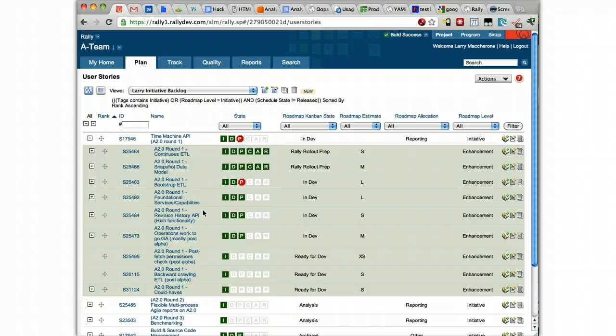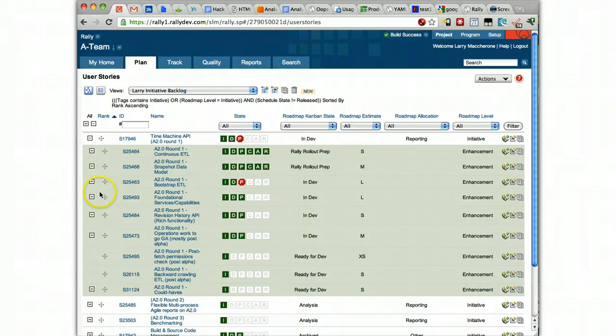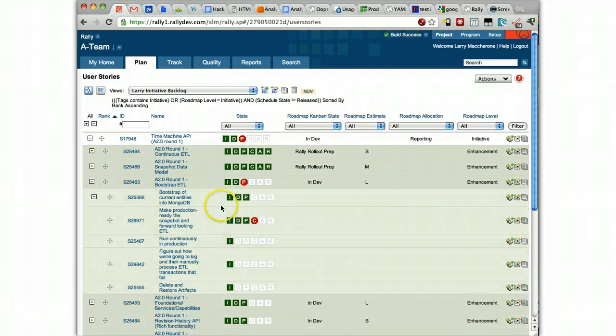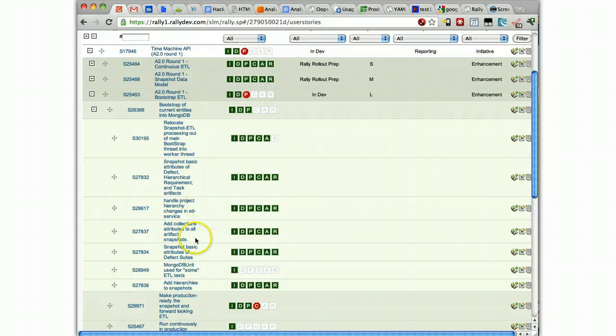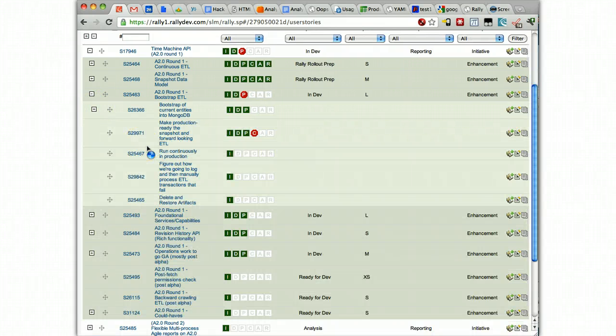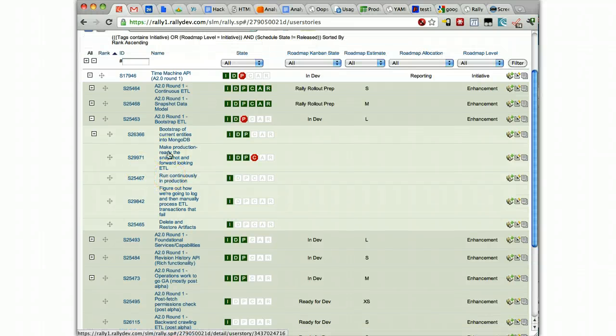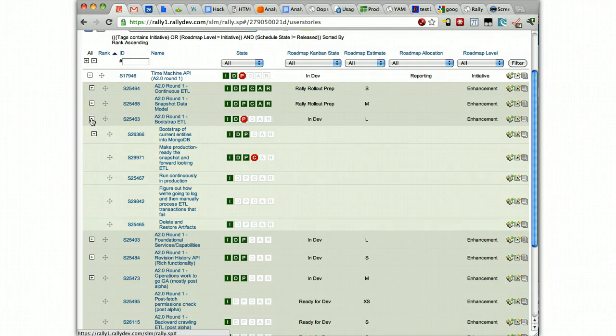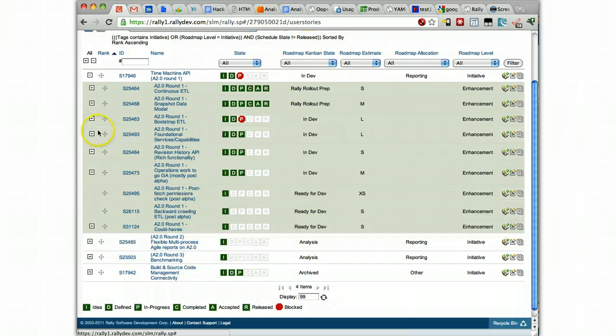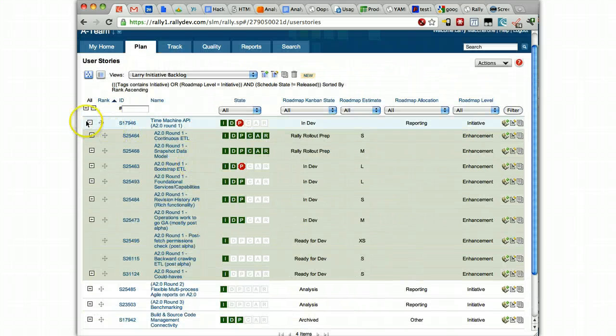Initiatives is where we get funded. Enhancements and enablers is really where the POs end up doing most of their analysis. And then there's a level below that that is where the team ends up working. And this can actually be several levels deep. The team has decided to break this particular part down into another level as well. So you can have N levels of hierarchy in your work breakdown structure for Rally.